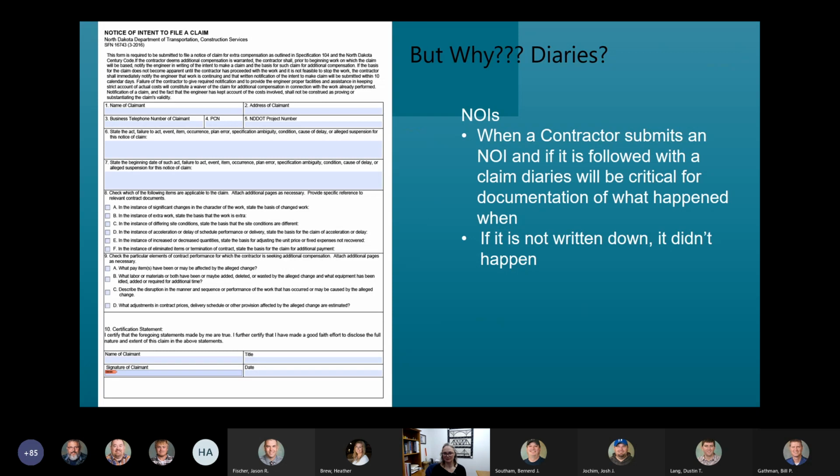Most of the time, the contractors guess about the dates and the times after the fact. But if our team can pull out a good project diary that shows dates and times and names the people on the site at the time, or an email that was sent, it can really help our defense if we have to go down the road of an NOI or a claim.